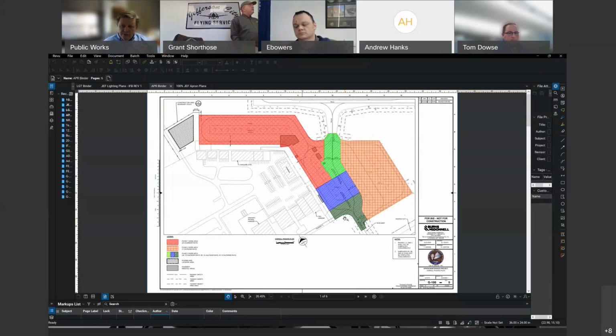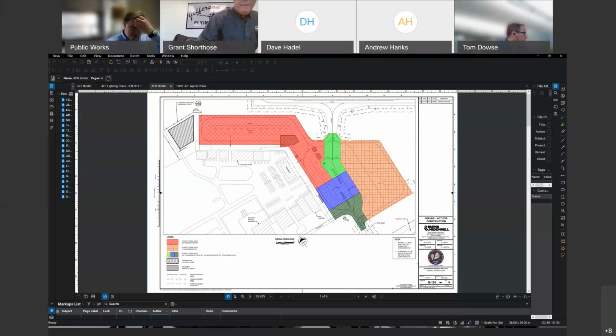All right, and just to reiterate what we're anticipating, if we get these bids together as we hope, we're looking at a notice to proceed probably in the May timeframe, with construction starting then, and substantial completion sometime around the 4th of July. That's what we're anticipating at this point, but there's a lot of hurdles to be jumped between now and then. So that schedule's still a bit fluid, and Eric will be keeping everybody up to date as we go forward.